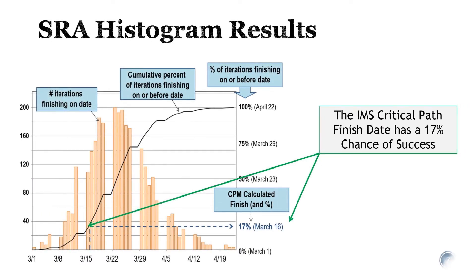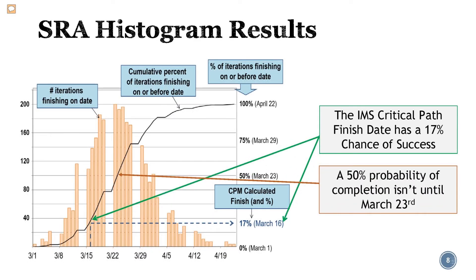The results of the SRA are often depicted using graphics generated by the SRA software. This is a sample histogram, which plots the number of predicted completion forecasts hitting each given date in the date range. In the output shown here, the SRA results report the project is predicted to finish anywhere between March 1st and the week of April 22nd. The modeling reached 100% on April 22nd, which means there is a 100% chance for the project to be finished by that date. We can compare this to the project finish date currently calculated by the deterministic critical path method schedule, which is March 18th. According to the output of the modeling, there is a 17% chance of the project being finished on or before that date. Statistically, the project doesn't even reach a 50% probability of completion until March 23rd, which is a full week past the current finish date.